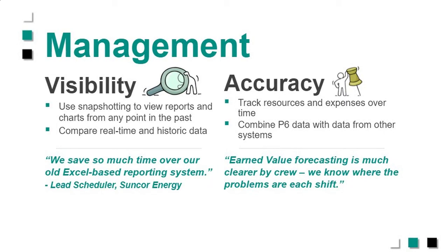And then in terms of the visibility, for the leads and the managers, being able to compare in real time back to where we were and what's going on with trends, that's a huge, huge win. Because it's one thing to say we're behind right now, but maybe it was just a blip. But if you see that on 3, 4, 5 subsequent updates that certain groups are struggling, you can see that much better now with this kind of capability.